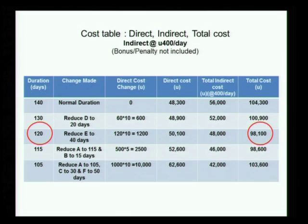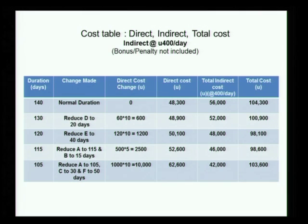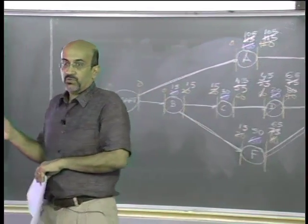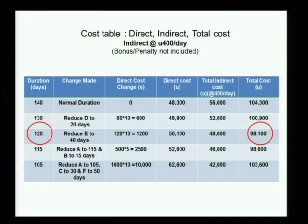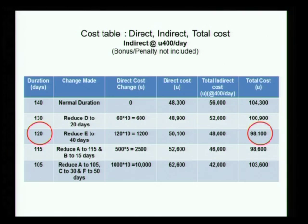Now what happens when we add bonus and penalty? Remember the bonus and penalty was 300 per day. Can you add the bonus and penalty to this and see how the results differ? We need to know the schedule first. Our normal duration is 140. If it is 140, there is no bonus and no penalty. If it is 130, that is 10 days of bonus — 10 times 300 equals 3000. If it goes to 120, it will be another 3000. What if I exceed 140 and go to 150? That is 10 days of penalty.